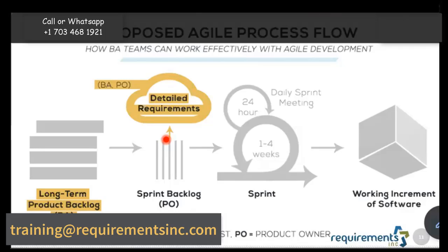And some teams even do t-shirt sizing in their project. They'll have only 5 values: extra small, small, medium, large, XL. And that's it, right? They'll just put these on each user story. And then you will have some sort of a computation. You might say, okay, extra small is 1, small is 2, something like that. And then you compute it.